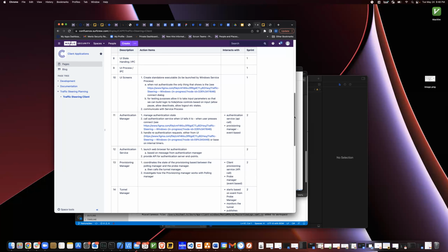And with the new architecture, we need to separate the UI process and the background service. I am afraid that if we change the architecture right now, it will affect the project's timeline. So I would like to ask Chris about the impact.